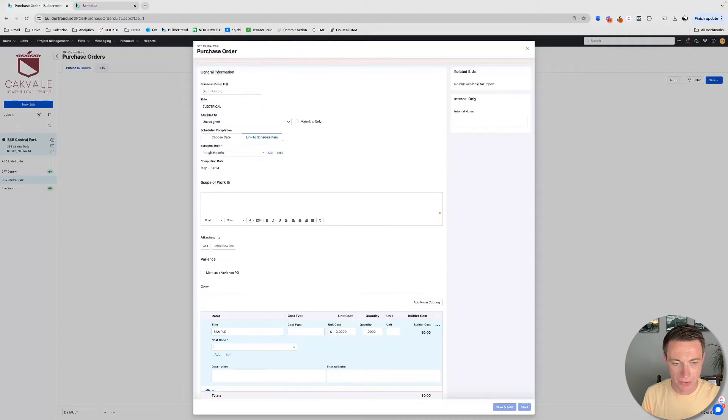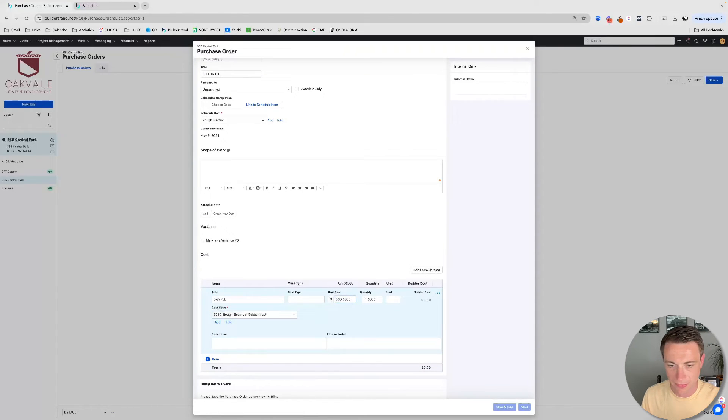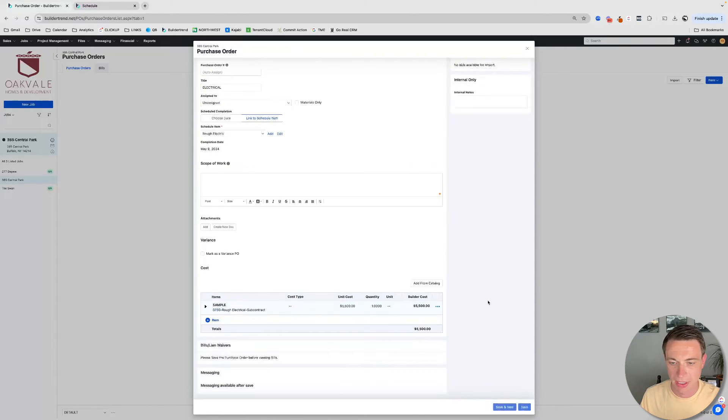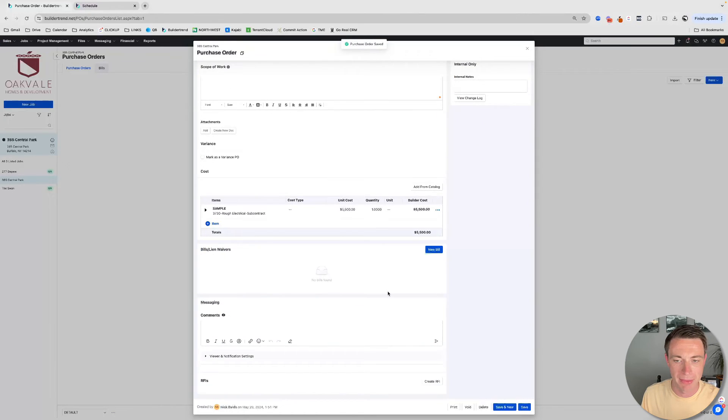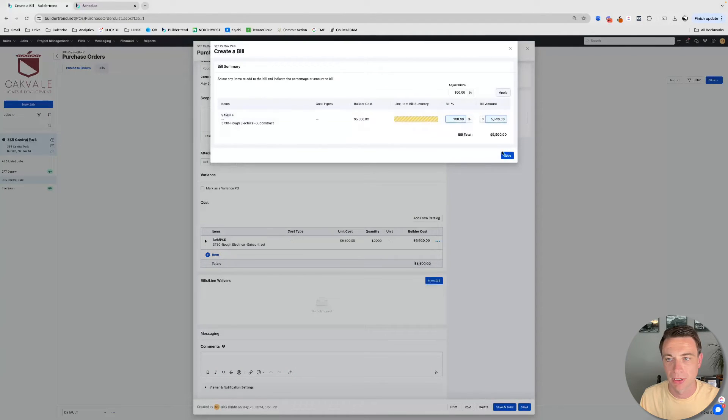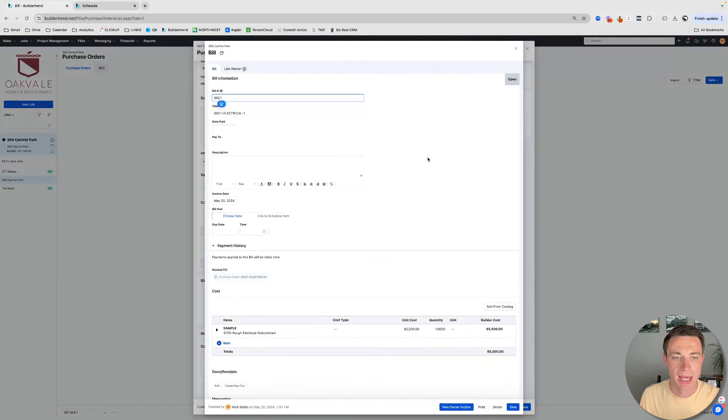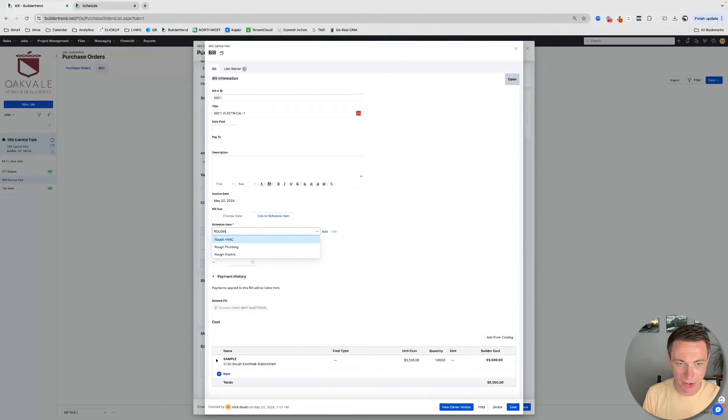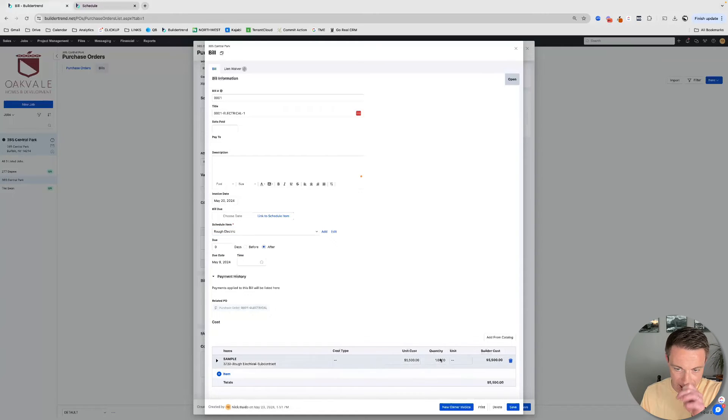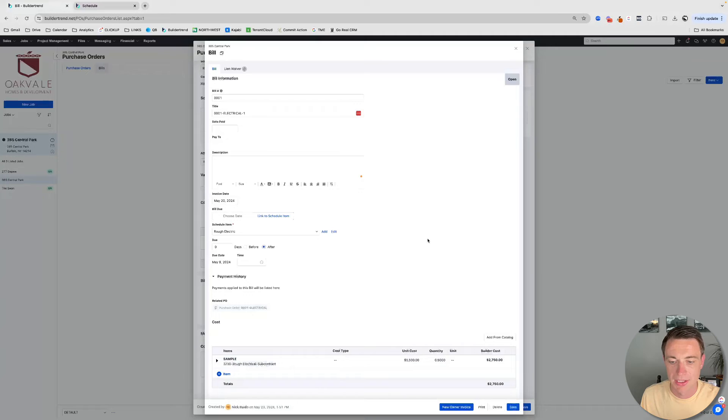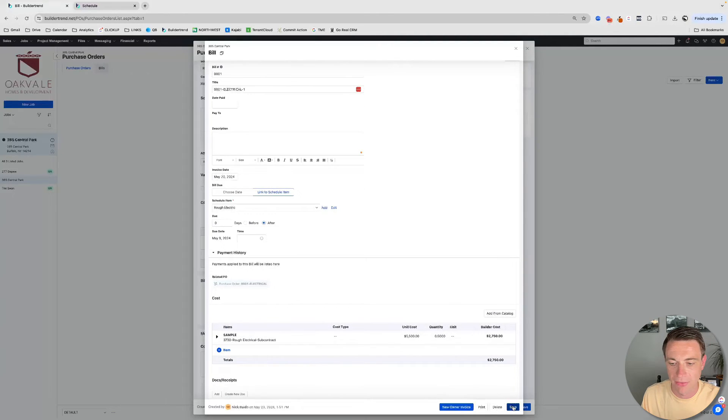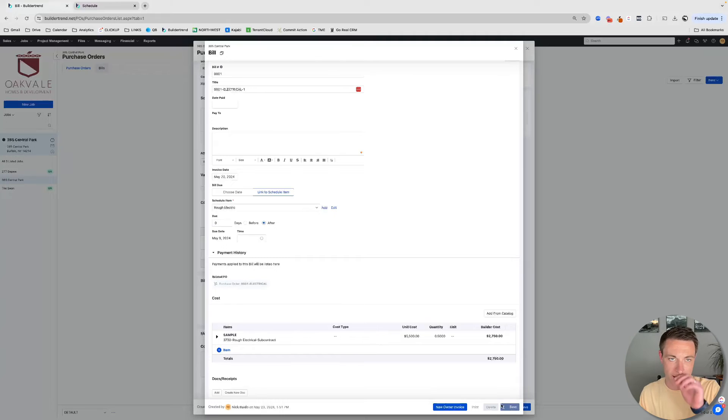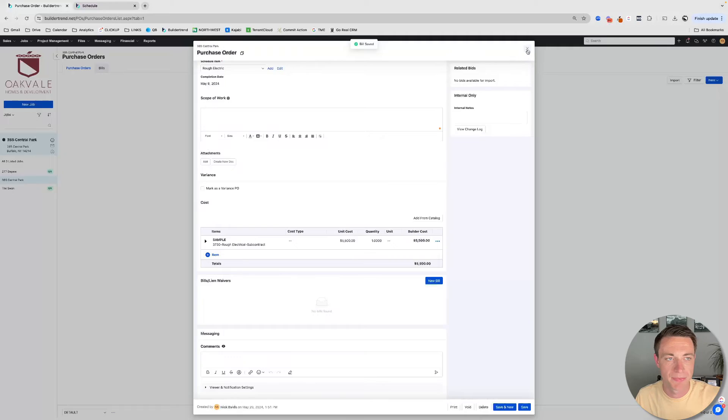We'll do a real deep dive on POs. Don't worry, I'm just going to kind of get something in there so that we have a PO for $5,500. Our bills, which are the actual payments that we're going to be issuing against those POs. So I'm just going to create this bill real quick. The bills, we can then link to the schedule item as well and say, when rough electric is done, or in this case, let's just say that I owe like 50%. Let's say that the entire electric is going to be $5,500, but some of it's rough, some of it's finished. I can say that, you know, zero days after rough electric is done, I'm going to owe $2,500. And then I can create another one for finished electric, which I don't have the schedule item yet, but I would do that. So bills and POs, awesome.